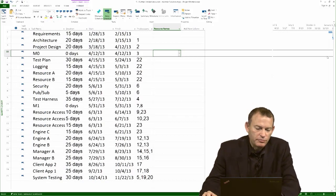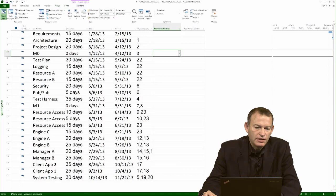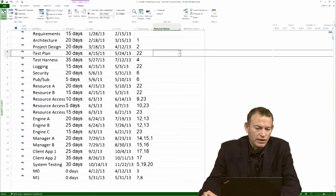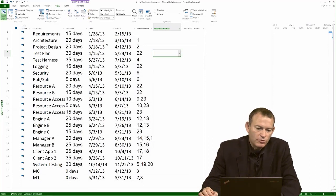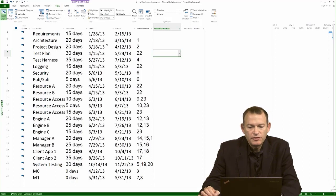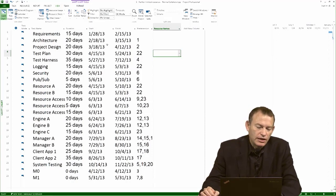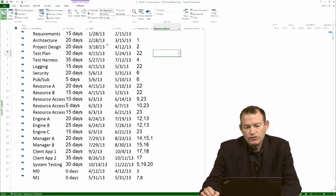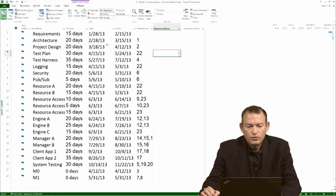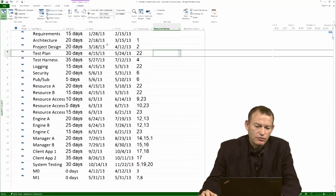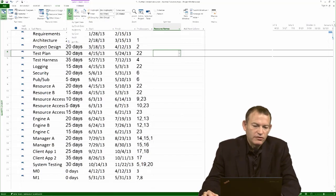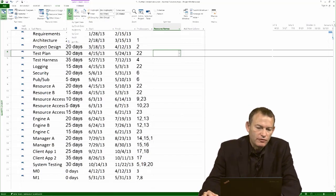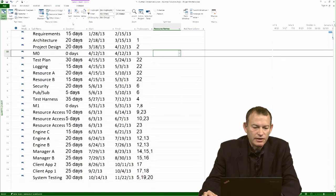And so, I'm jumping into Microsoft Project here. The first thing you do whenever you open a Microsoft Project file is sort it. So, make sure exactly where you are. Let's just sort it by ID. Next, I'd like to do some color coding. Color coding is good because of task continuity. I'd like to make sure that developers that do a particular kind of task keep doing that kind of task. It's also a good idea to actually use color coding so that you can see what is the next type of activity you should be assigning to. In addition, I'd like to also do color coding of milestones, which don't require, of course, any kind of resource.